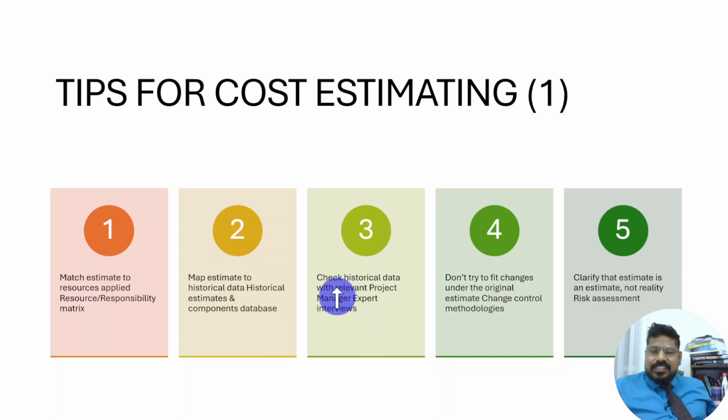Otherwise, see the time difference, and recalculate the inflation. Let's say this project has been done 5 years back. What kind of inflation has happened? Include all those factors. Currency change. Let's say this kind of project was part of the Middle East, and now you're based out of an Asian country or European country. Do the recalibration of the inflation as well as the currency rate change.